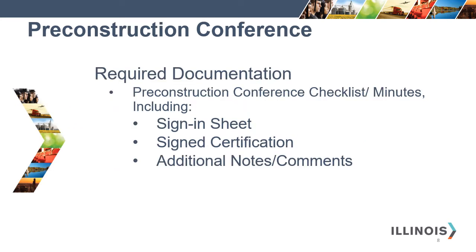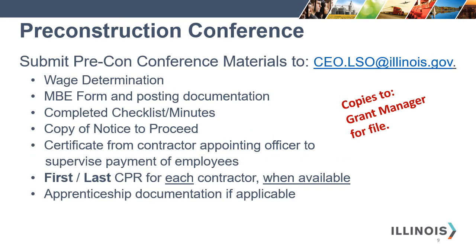The required documentation for the pre-construction conference includes the pre-construction conference checklist and minutes, including the sign-in sheet, the signed certification page, and any additional notes or comments. Listed on your screen are materials that are required to be submitted to the Labor Standards Officer for the pre-construction conference.